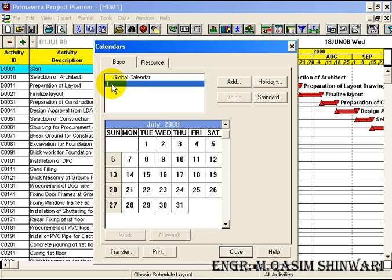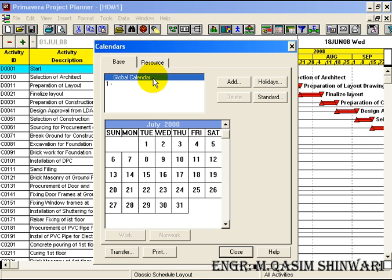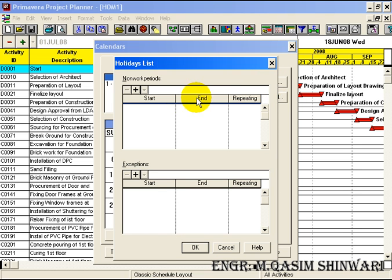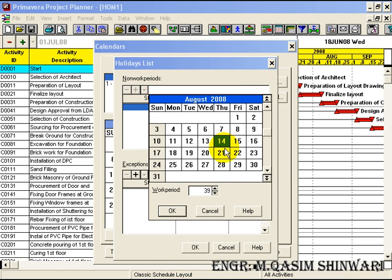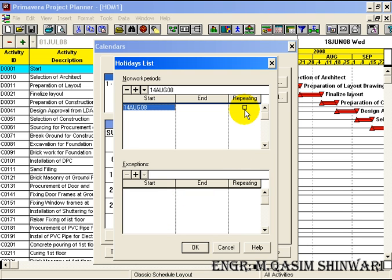Let me make some non-working days in the global calendar which are repeated every year. Click on global calendar and go to Holidays. The first non-working period we will add is 14th August 2008. Click on OK and, as it will be repeated each year, check the repeating checkbox.